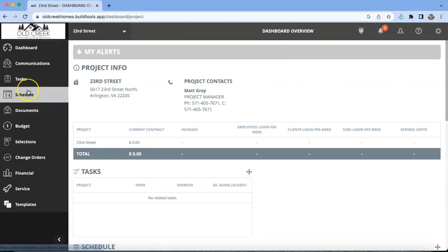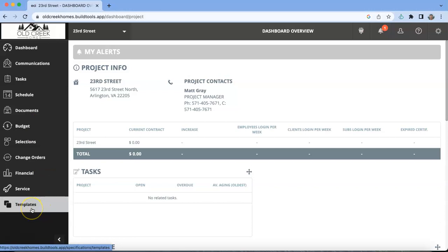And first things first, we want to release the civil engineers. That's the long lead time item in our schedule. So in our scheduling templates, you'll see that the long lead time is to get on the schedule with whoever the civil engineer is. Typically, it's going to take them a week to send back a proposal, up to 6 weeks to get on their schedule, and about 2 months total to get the first topo of boundaries.